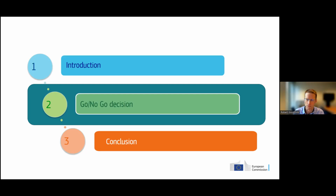Then I want to talk a little bit about transparency. I think some of the challenges we've had with projects in the sector is that they haven't always been transparent in communicating what is going on in the project and problems that they've had. And it's difficult to have one simple explanation for this, but often we see that one of the elements seems to be because the financial construction of some of these projects is quite fragile, and they are concerned that if there's any bad news in the project, that it will affect any ongoing negotiations with investors. And so, of course, that makes it for us as the funding giver, and in a sense, one of those investors as well, very difficult to have the overall picture.